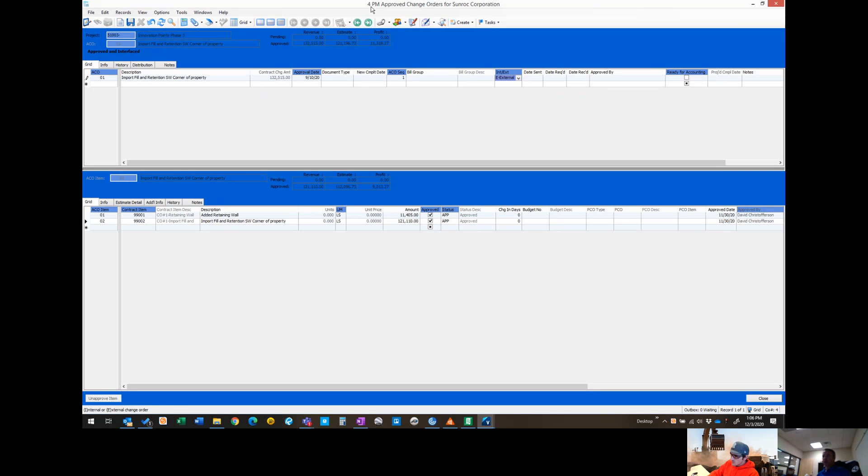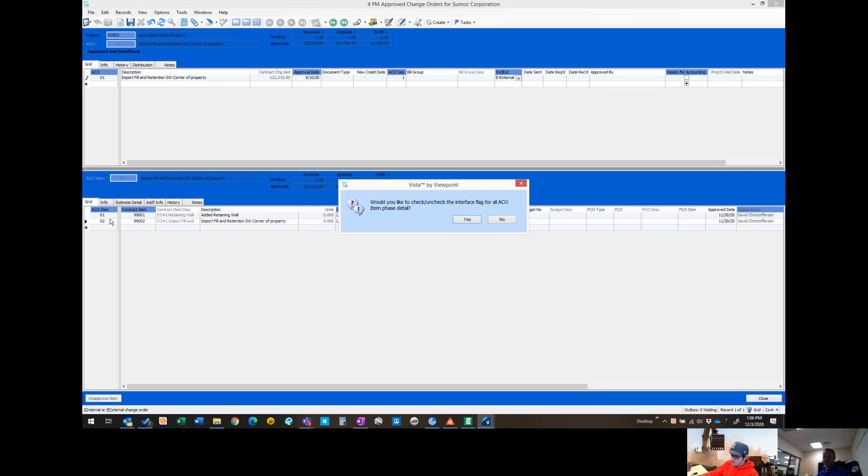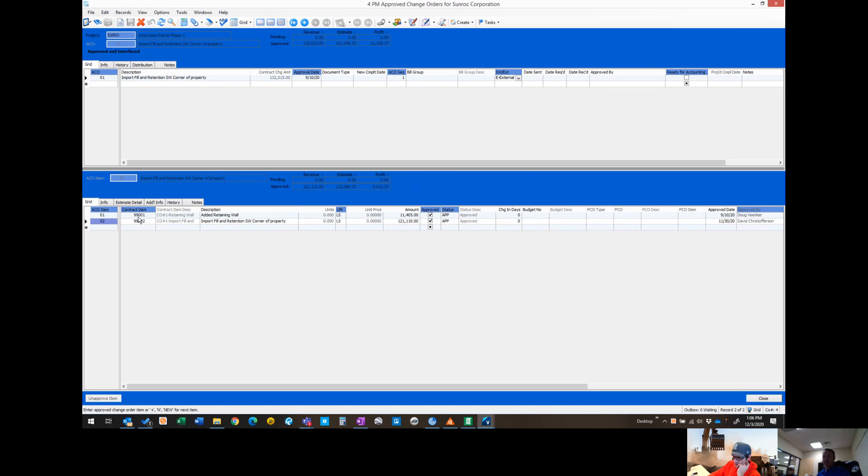We're in the PM approved change orders. You've got two items in this change order. Item one is some added retaining wall, and item two is imported fill that we've hauled in and placed.